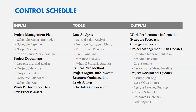The outputs of Control Schedule include work performance information — you take the work performance data input and turn it into useful information, such as whether you're ahead or behind schedule. You also get schedule forecasts, predicting when you'll finish or hit certain milestones. As is common in monitoring and controlling processes, you'll also have change requests, updates to the project management plan, and project document updates.